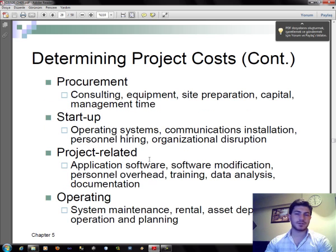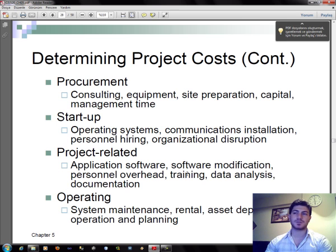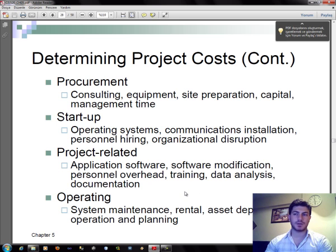Cost categories include: Procurement — consulting, equipment, site preparation, and capital management time; Startup Operations — systems, communications installation, personnel hiring, and organizational disruption; Project-related — application software, software modification, personnel overhead, training, data analysis, and documentation; Operating — system maintenance, rental, assessed depreciation, and operating and planning costs.